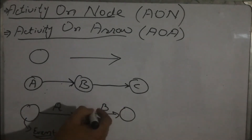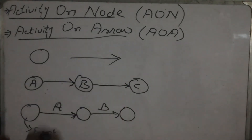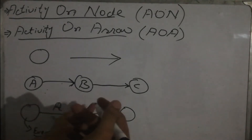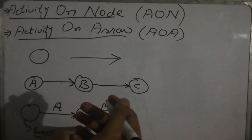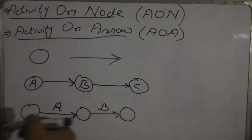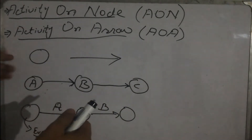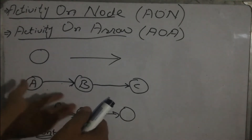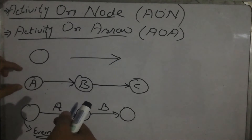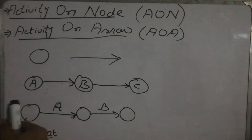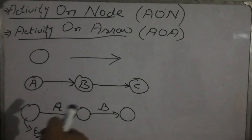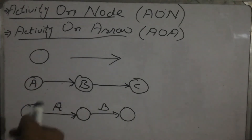In Activity on Arrow, nodes represent events where an activity has been completed or started. For example, the tail of an arrow represents the event where activity B has started and activity A has ended. In Activity on Arrow you show the activity by the arrow, while in Activity on Node you show the activity by the node, and the arrow represents the precedence — which activity is followed by what.